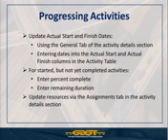Or there's what we call a physical percent complete, which is not based on duration or effort. You're just making an estimate of what the percent complete of an activity is, regardless of duration or effort on those tasks.